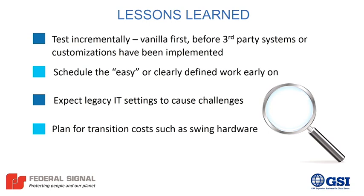We were trying to move from our on-prem environment. That's where 9.1 was first. We had 8.11 out in the cloud, but our 9.1 environment was on-prem, and we thought we'd be able to just migrate the code pieces and go back out to the cloud. And that's where we lost a lot of time. We actually had to move the environments together to do the transition.